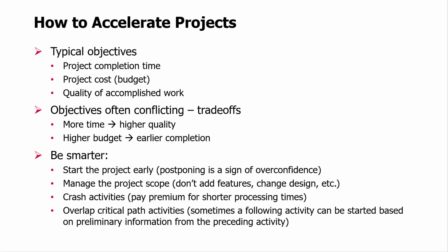Often, let's say, in product development projects or software development projects, sometimes the managers keep adding features or changing design during the project, which actually increases the activity times and postpones the project completion time, sometimes by a lot, right? And the project might actually be delayed so much that the new product is no longer a useful product to be introduced, or new software is not introduced before the competition introduces an even better software, right?